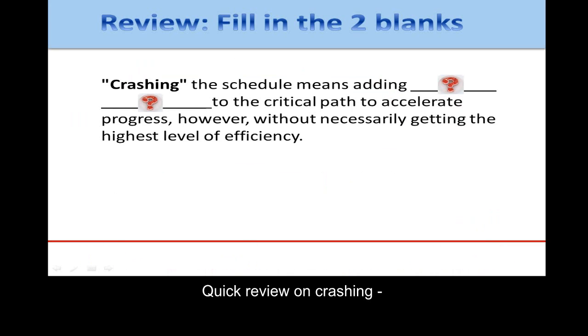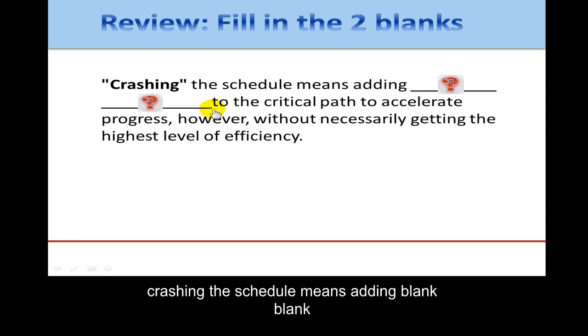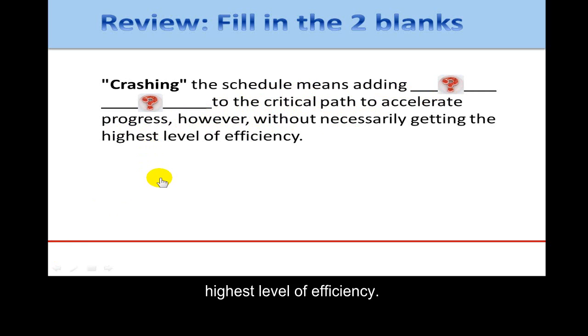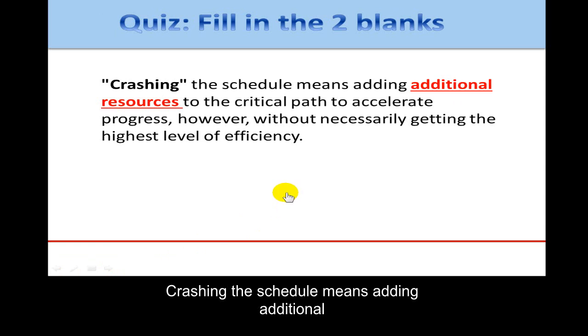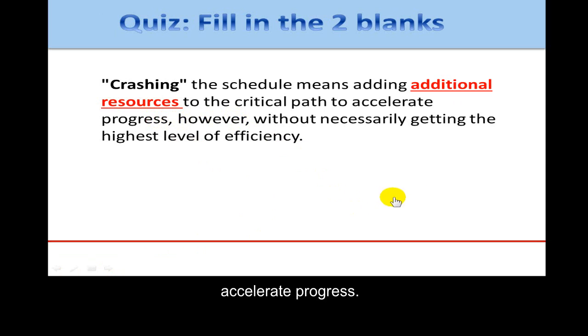So a quick review on crashing. Fill in these blanks. Crashing the schedule means adding blank blank to the critical path to accelerate progress, however, without necessarily getting the highest level of efficiency. Crashing the schedule means adding additional resources to the critical path to accelerate progress.